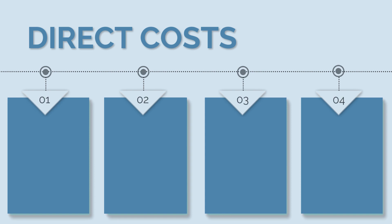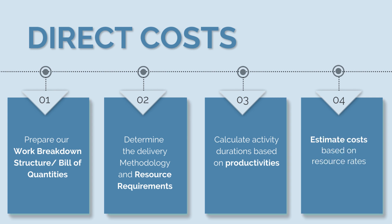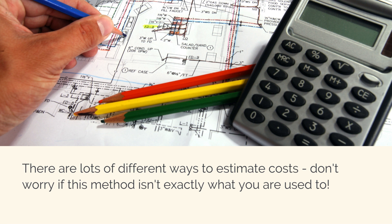Calculating direct costs is a process in itself. First, we prepare our work breakdown structure and bill of quantities. Next, for each activity in our WBS, we need to understand exactly how we are going to complete that construction activity and what resources are required. Then, based on productivity rates and the quantum of work from our bill of quantities, we estimate the activity duration. From our base resource costs, we then calculate our resource rates. It's worth noting there are lots of different ways to estimate costs, so if this method differs slightly from what you're used to, have a go and see if it works for you.